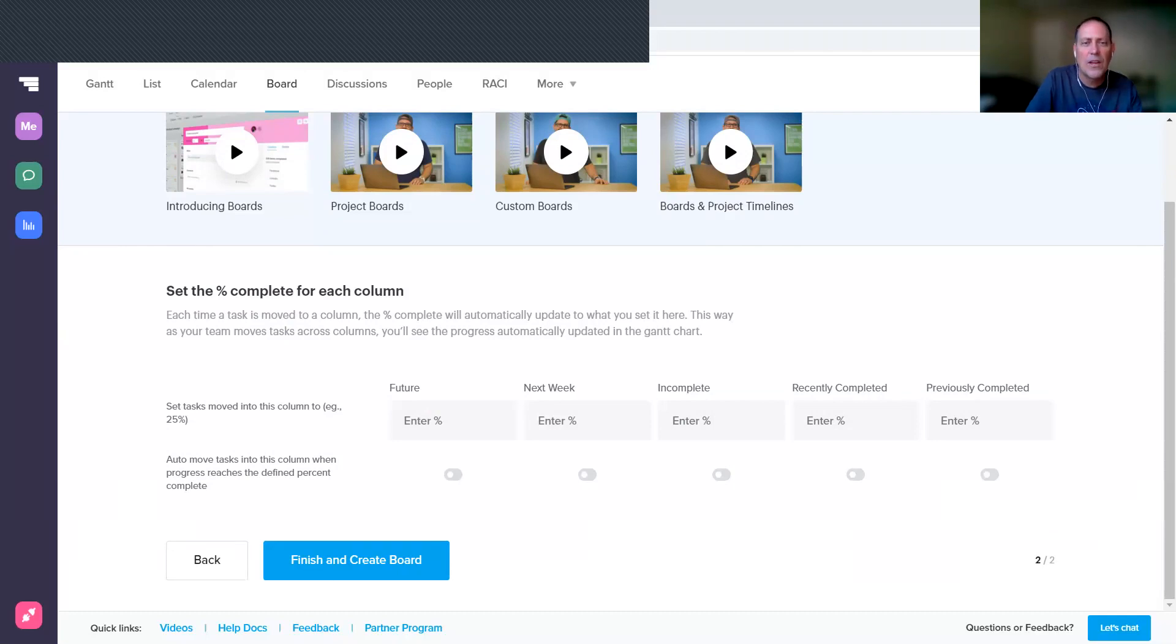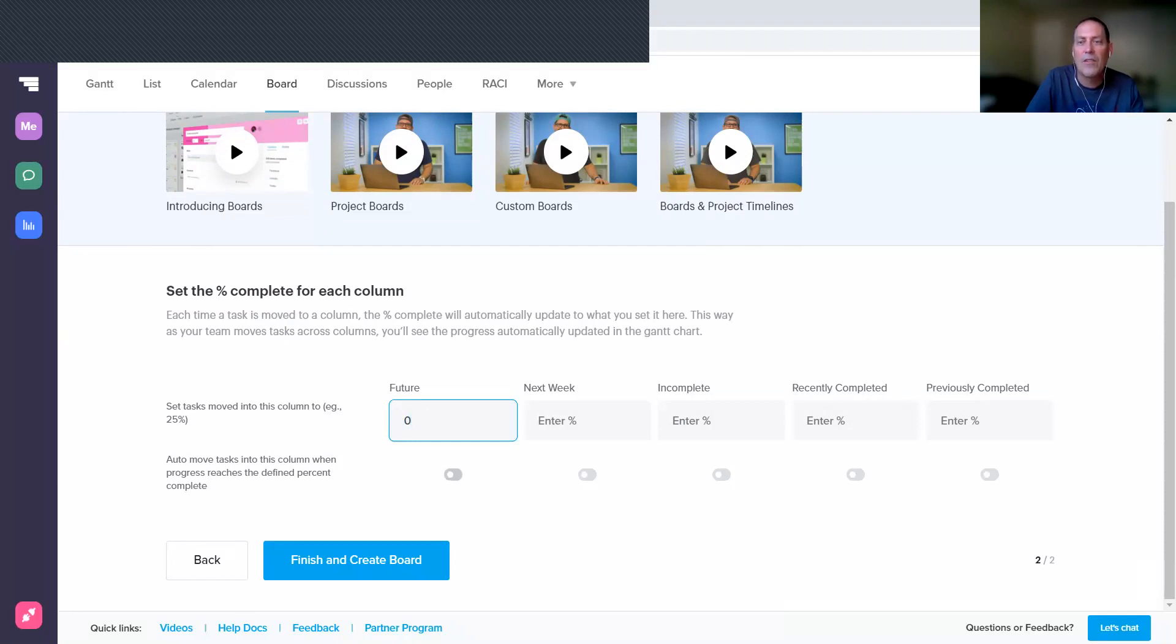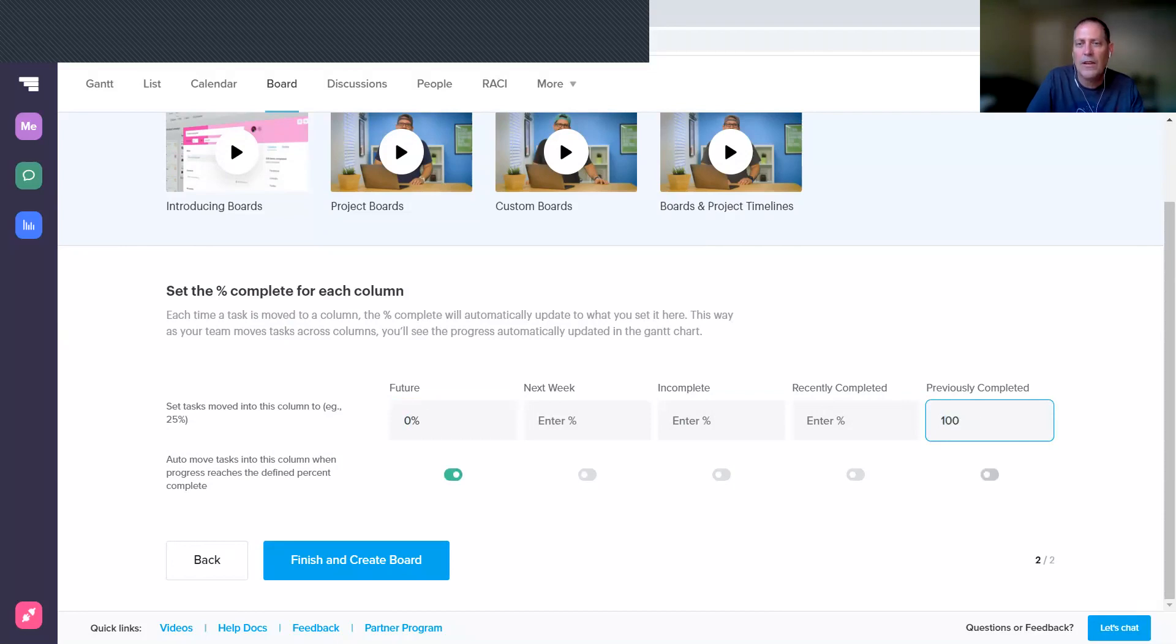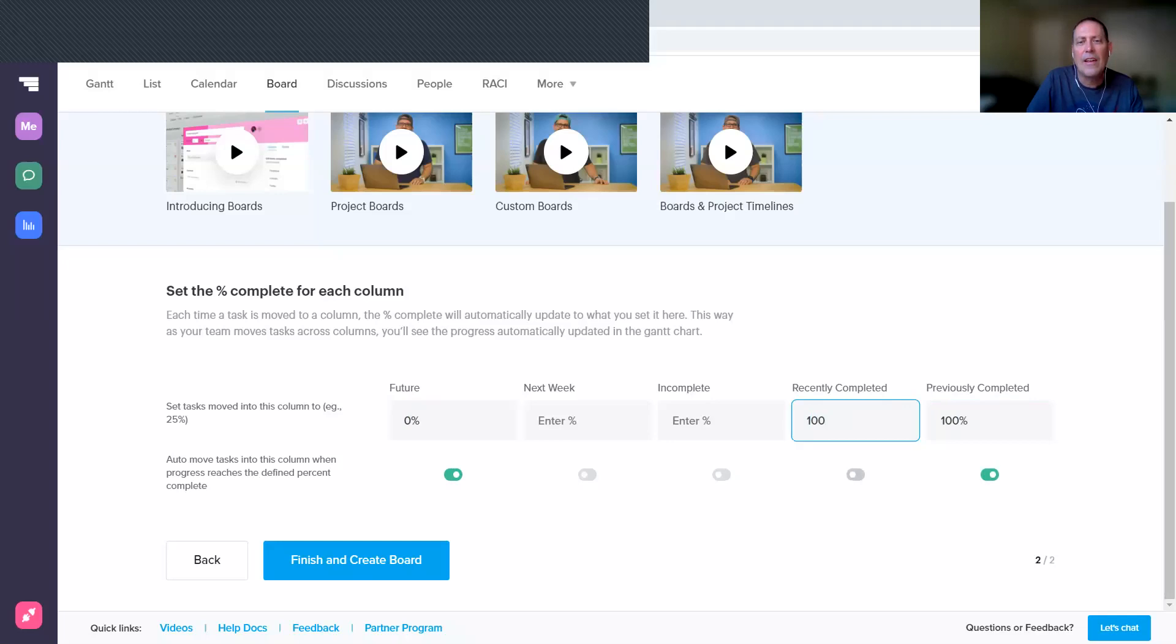This is kind of nice—it means you don't have to update the percentage completion. You can just move it between the columns, move it into the right one that represents the completion. So for Future, if something's in that column it should be zero percent because you haven't started it yet. At the opposite end here, anything Previously Completed should be at 100%, Recently Completed should be at 100%.